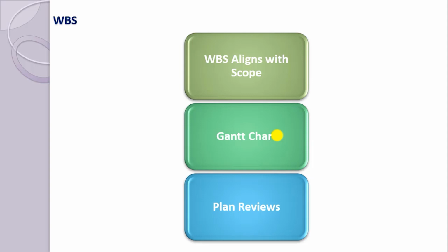If your customer itself is not clear on the requirement, or the clients have got new requirements, then the plan keeps on changing. So you can review the plan with a group of people, and I recommend that you conduct separate plan reviews for different groups of people. For example, your project team will have different interests from the project's stakeholders and from the project board.